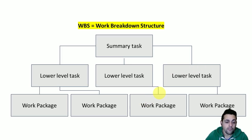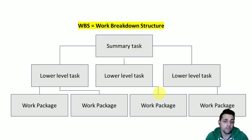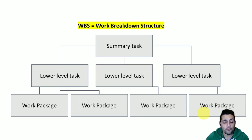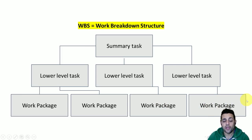When we are making a work breakdown structure, we always try to keep in mind the MECE principle, which is mutually exclusive, collectively exhaustive. That means that all of the activities that form the lower levels of the tree — the sum of these activities — must form the entire work that is related to our project. But also, there should not be any overlap between the work of different activities. So always keep in mind the MECE principle.